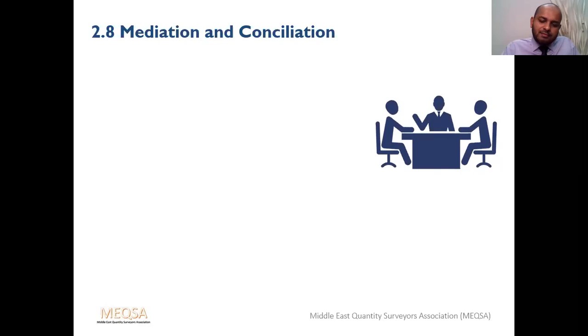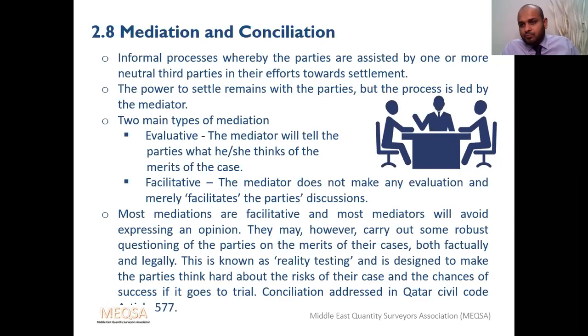Mediation can be done by anybody who has the capacity and capability, which is skill. But conciliation can be done only by lawyers or judges or people involved in contracts. They have the knowledge of contracts and litigation, because there are processes to be followed in conciliation. Mediation, anybody can do.